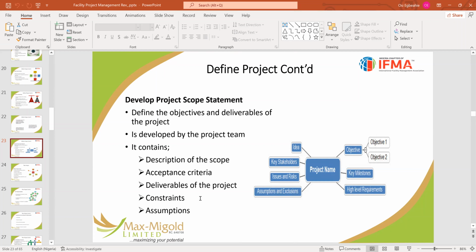There are always constraints in a project that will slow you down, that give you a boundary that you cannot go beyond. For example, you cannot tile and do the ceiling at the same time. Once you're at that point, one has to give way for the other. It's a constraint. Before you can do the ceiling, you must tile. If you say, I don't want to tile, I want to do my ceiling first, then that means you are not ready to tile correctly, because it is one of them that must happen first, and that's what we call dependence, in front or in the reverse.